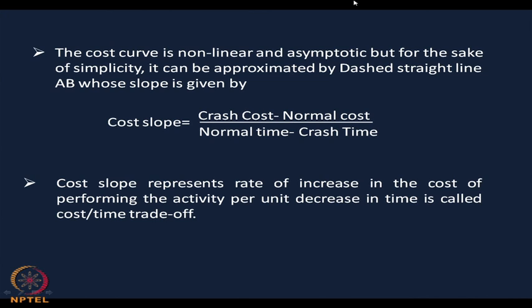The cost slope represents the rate of increase in the cost of performing the activity per unit decrease in time, which we call the cost or time trade off.